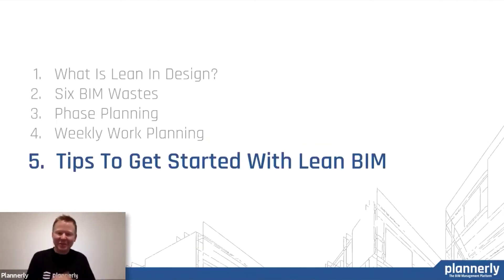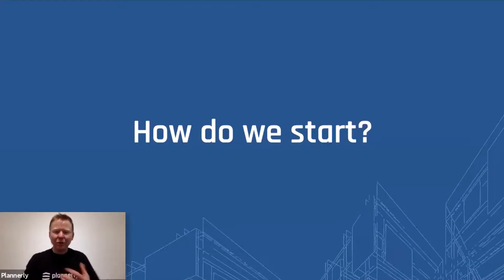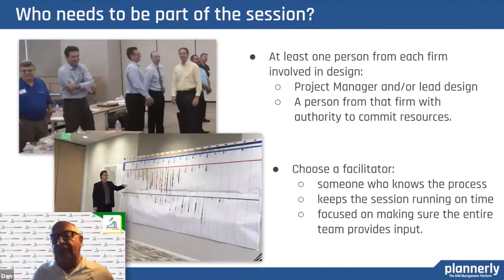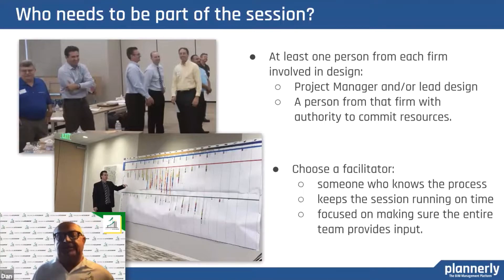So we've talked about lean in design, the waste we're trying to attack, phase planning from the milestone, and weekly work planning. Let's look at a couple of tips to get started. You pull in one person from each firm involved in the design — you need really two people initially: the design lead, and a person with the authority to commit the resources for that organization, because we're going to want to staff in a way that we can meet the commitments made. Then you want someone who's a facilitator — who knows the process, keeps the session running on time, and makes sure everybody on the team provides input.